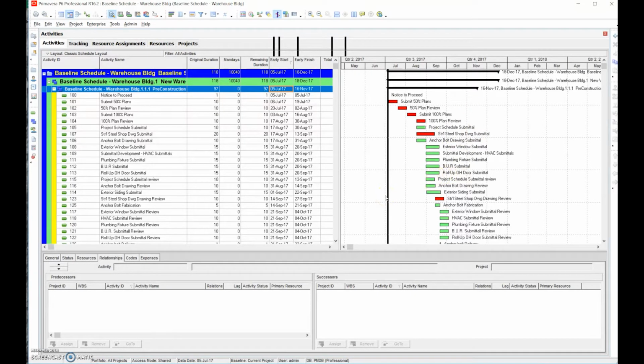In the construction activities, we want to make sure it makes logical sense between the construction activities, not necessarily from the pre-construction activities. So we want to separate those two because it's easier. In my experience, it tells me that we need to separate those to be able to show that.